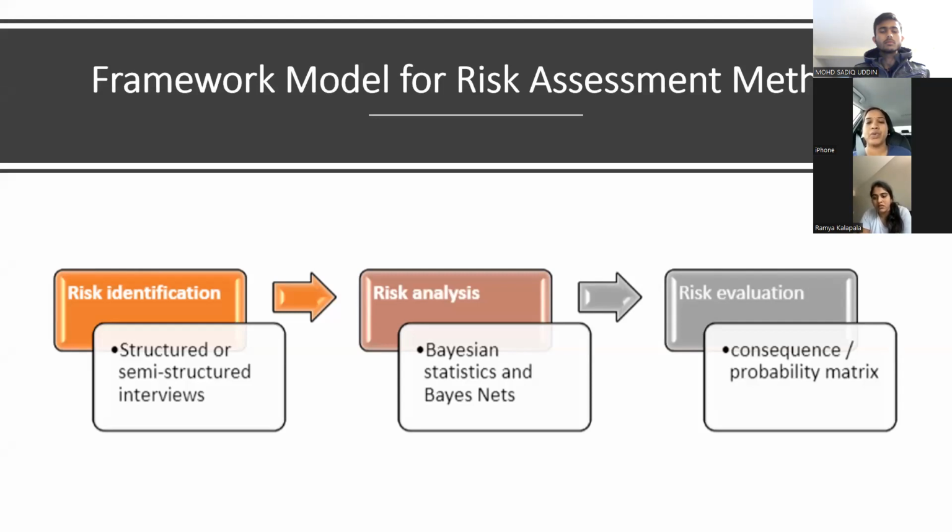According to the ISO standard, risk assessment mainly consists of three successive stages. The first stage is risk identification. This identification process should be carried out as thoroughly as possible, taking into account all relevant contexts, factors, and circumstances. The risk identification process can be aided by the risk assessment approaches, which define the most generally used techniques for hazard identification and analysis. The standard's content lists 31 approaches, which are grouped into categories based on their applicability to the problem and given a suitability rating.